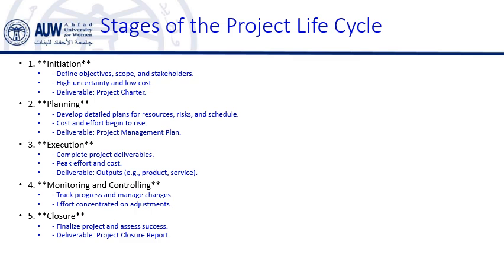For example, if we now consider a procurement project, during the monitoring phase, the team tracks delivery timelines, cost, and quality of the products purchased from the suppliers, and the services being procured, ensuring everything is aligned with the procurement plan. The last phase or stage is closure or termination.